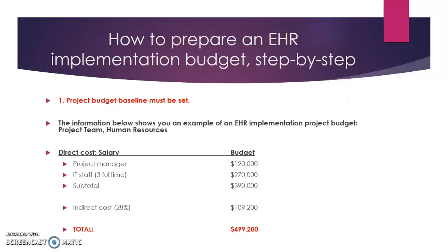How to prepare an EHR implementation budget, step by step. The first step is that the project budget baseline must be set. The project baseline budget is often difficult to create because the price of each item can vary greatly depending on quality, negotiation, and business relations.